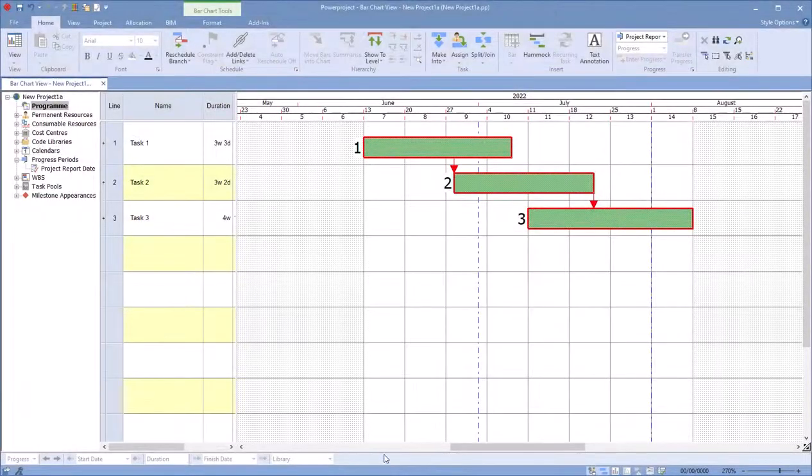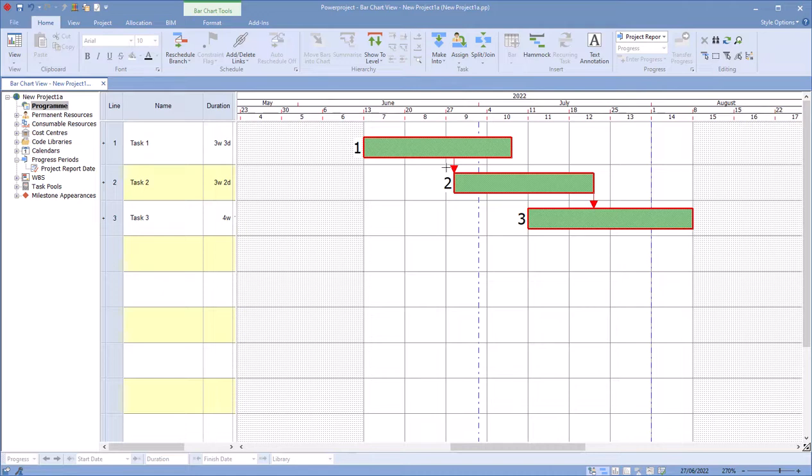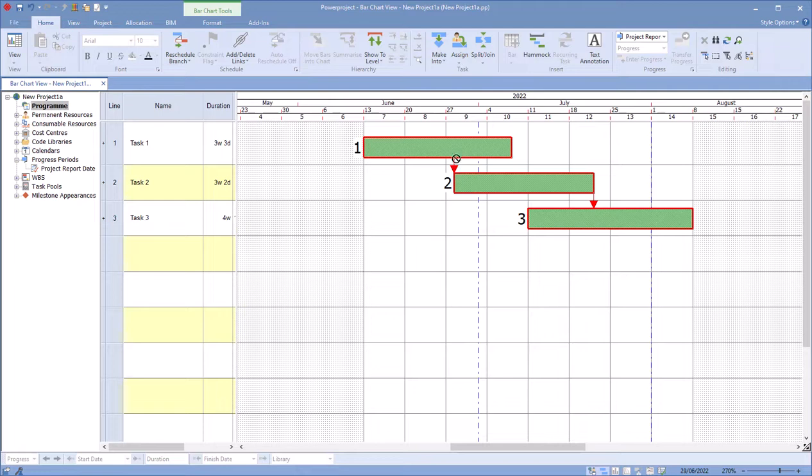In this example, we have a simple project with three tasks. The links come from midway through the first task and then the end of the second task to midway through the third task.